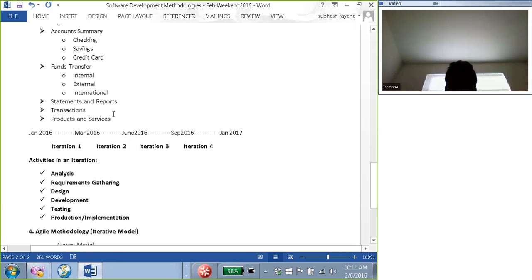And also, I think one of the questions was, do we have the feasibility to go back and forth in this whole process? Yes. In this whole process, you can basically keep going back and forth between requirements gathering and design, or development and requirements. And again, can we accommodate the changes? There are things where the development team has to be in the loop. But normally, if you're asking me how long an iteration is going to take, an iteration technically will be anywhere between 3 to 6 months.